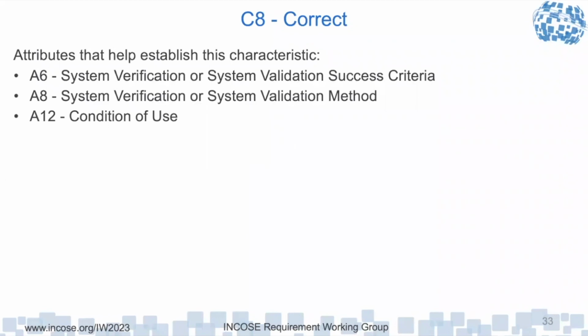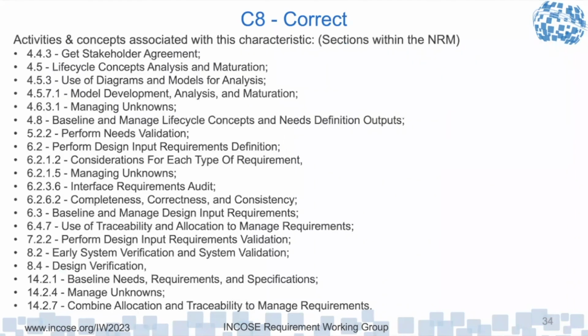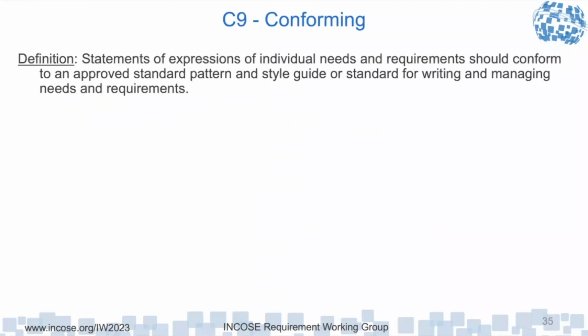I also talked about it on Monday, a thing called the applicability matrix as a way to filter out which ones apply. Some of them apply at the system level, some may apply lower down, so they shouldn't be invoked until the proper entity applies. Yeah, it doesn't absolve you from going through the requirements in that standard that are applicable to your product in the use that you are, and at which level, which entity within your product. Right. Yeah. Lots of activities help understand correct use of the diagrams and models to help with that.